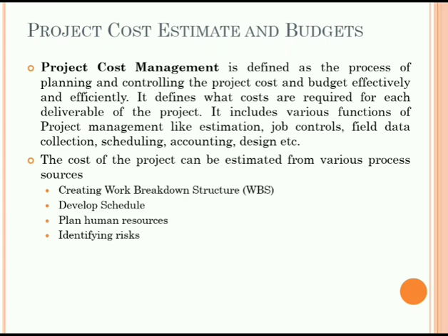The requirement of a particular type of resource, for example mason or carpenter or unskilled labor, over the complete period has to be known. A graph that is plotted for the requirement of resources against the period of requirement is known as a resource usage profile, or you can call it a histogram also. A histogram will reveal the non-uniform demand over the project duration very clearly.